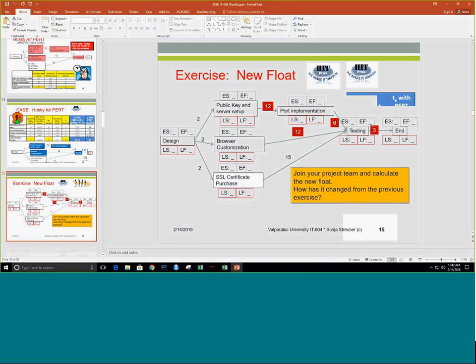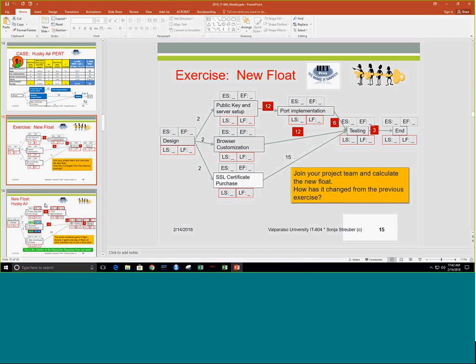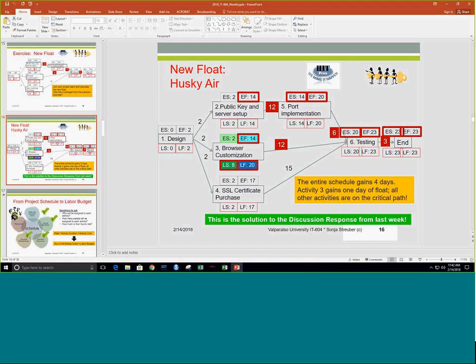So now that my durations take into account that Mike might be leaving, I have a much better idea as to how to calculate my durations for these activities. So I put the new values that I've calculated into my work diagram as the durations, and as you can see here for testing, I've picked 3, and I'm going to calculate the new float.